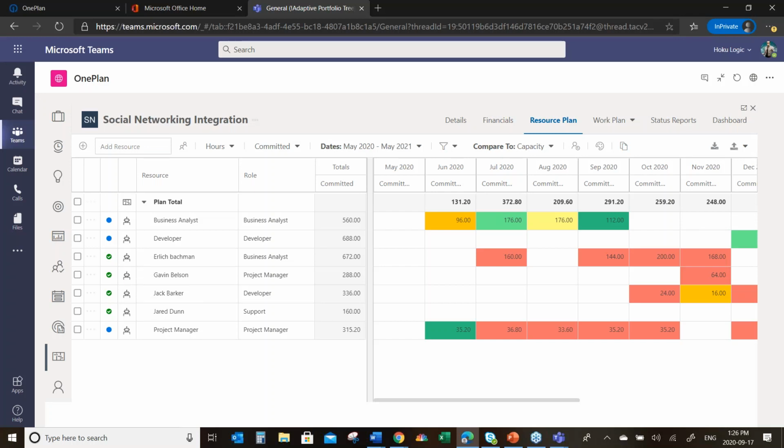So this gives me as a PM the ability to document what it is I need for this project, when I think I'm going to need it, and to sketch it out and sort of plan it at the level of detail that I need for now. I don't need to build a detailed schedule to get this data. I could, but I can stick to this grid format and go and put the people on the team that I need.